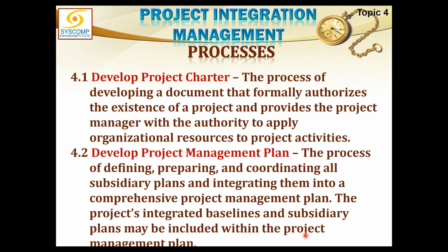It is the first time through this charter that we recognize, yes, this project does exist, and we assign the responsibility to a project manager, and we give him the authority to mobilize the resources. So the charter is that kind of a formal authorization document. Without this document, there is no existence of the project, no beginning point for a project.